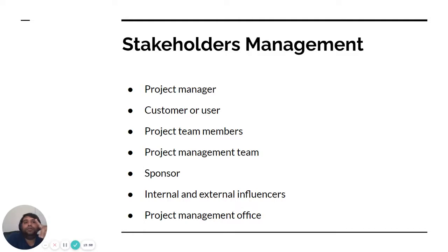One project manager, one or two BA people. In the two BA people, there would be a lead BA who is a part of a program, and another person is a senior BA or BA person who is dedicatedly working for this project. One architect, two to three developers, two testers, one scheduler or coordinator, slash we can say scrum master.